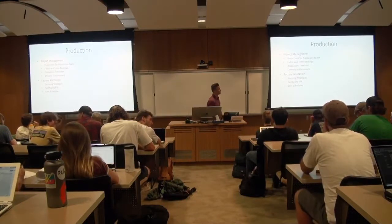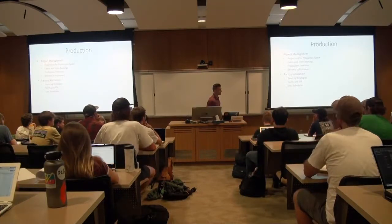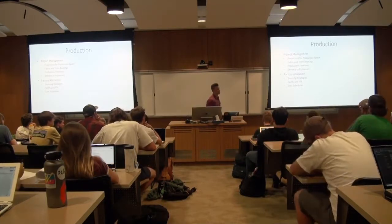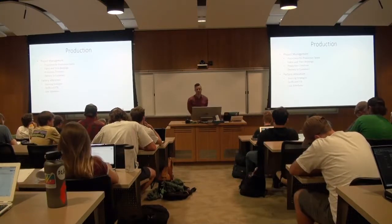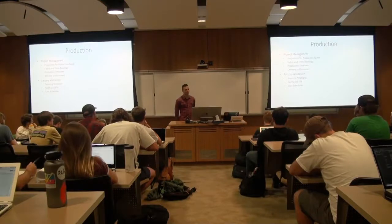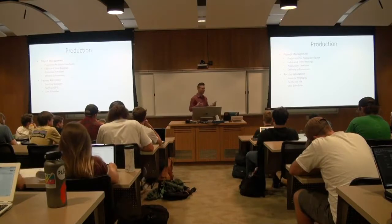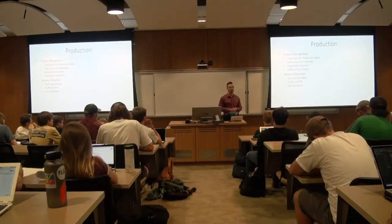Project management, this is a huge part of my job. Our new product lines launch in October to our sales force, and we basically have till December to figure out what we're going to order for the season. So what we're playing against is Chinese New Year. Regardless of where you're actually manufacturing the goods, most technical fabrics are coming out of China. So we have to have our orders in and they have to be running gray.